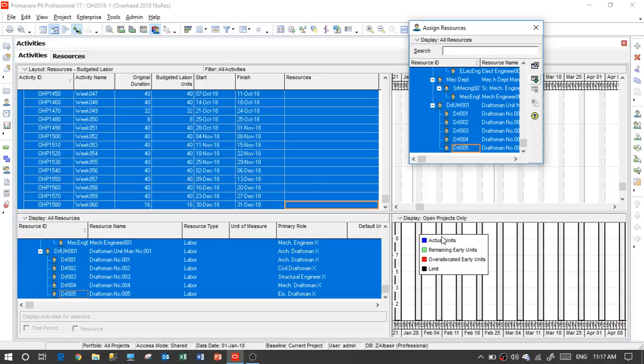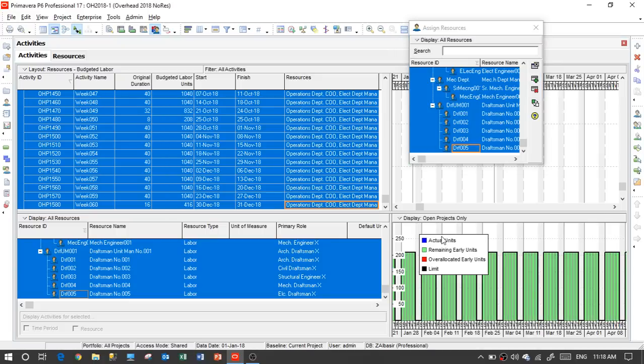So how does this work? After we put the full team on the overhead cost, this gives me, first, the overhead cost budget for this year for this team, which is the operation team, who are full-time employees of the company. So I know now how much overhead they are costing me. This gives me a budget estimate. Number two, I can add another cost, which is the planned cost, which includes overhead plus profit, which will be rate number two.